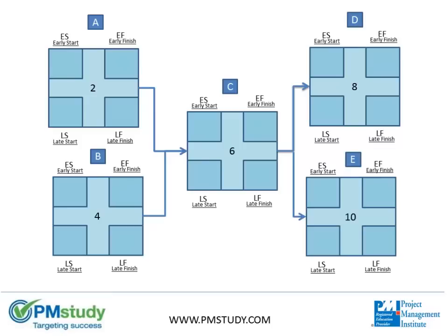Let's run through the critical path method to determine the float for each task, the critical path, as well as some other key information about our project schedule activities. The first step in the critical path method is a process called the forward pass. We'll calculate the earliest time a task can begin and the earliest time it can end.